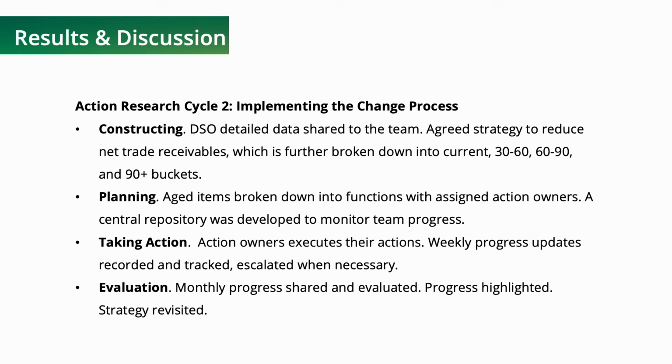During the planning stage, each bucket is assigned to a certain function to be able to designate a specific action owner. At this juncture, the team also agreed to develop a central repository of our actions and updates so we can monitor our progress. On to the action stage, each action owner executes their assigned actions, and all updates are recorded in the central repository. If necessary, escalation to the next level manager is done.